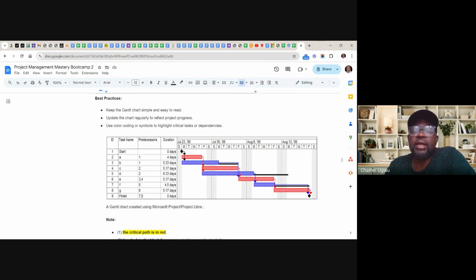And the main thing here is that the Gantt chart helps us a lot to fish out the critical path in our project, areas we cannot delay. You see this red part here, the part in red color, they are called critical paths. While working on a project, with all these parts, you should try as much as you can not to play around here, because if anything happens, for instance, this duration is 4 days, and you happen to miss it and do this in 5 days, it is going to disrupt the whole activities in this project. That's why we call it a critical path. So we tread with caution while working on this critical path.